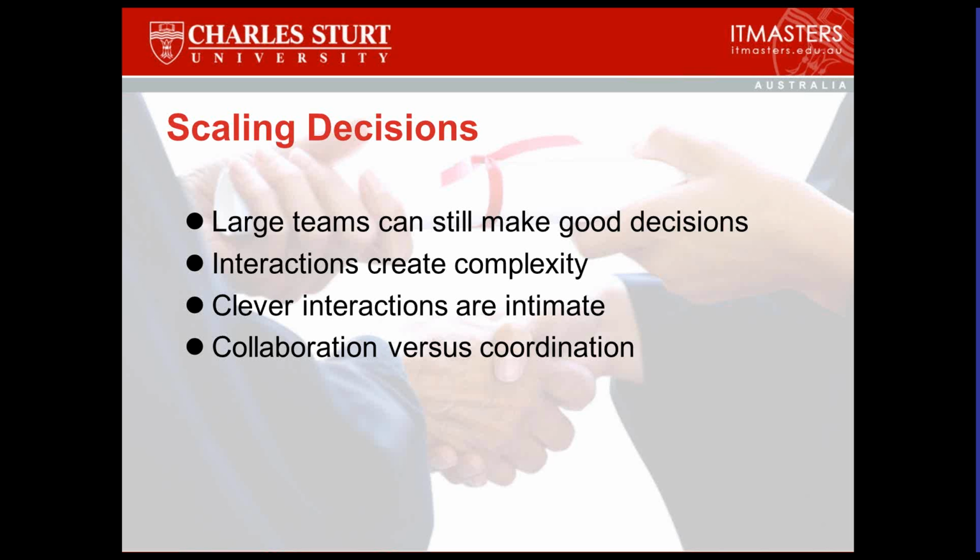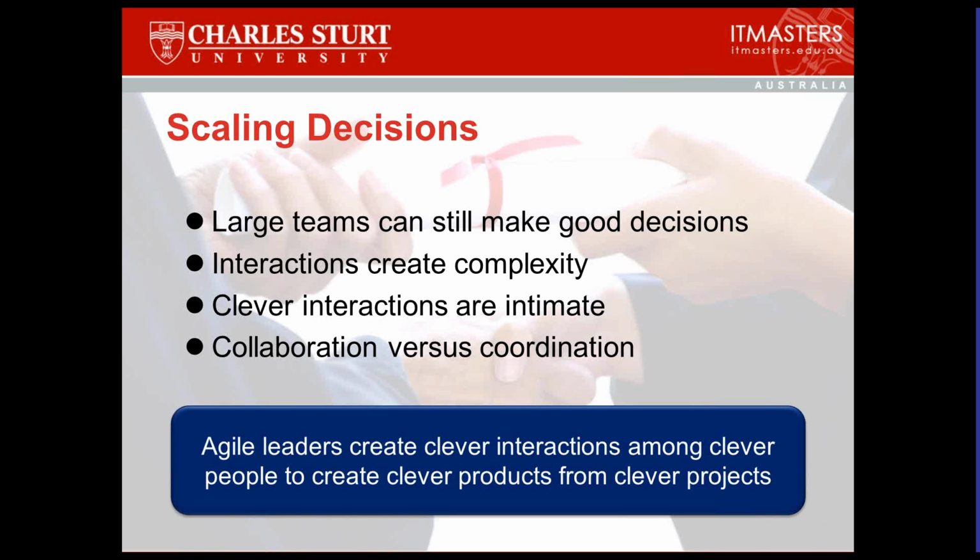So collaborators might be structured sub-teams. Small teams, small enough to work together to wield the information and the decisions to make the right decisions. And then different teams make other decisions. So the collaboration is structured and the coordination is, well, it's also structured, but it happens at a different scale. In really small projects, there's no difference. Collaboration and coordination happens at the same level. There's only a small number of people. It's where it gets bigger that you have to separate these two.